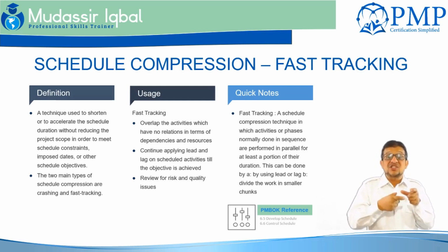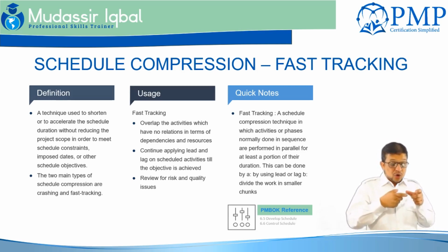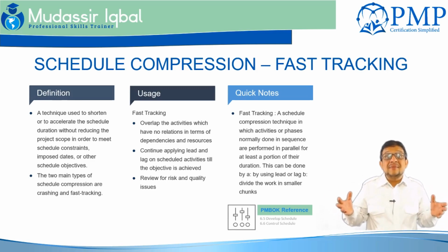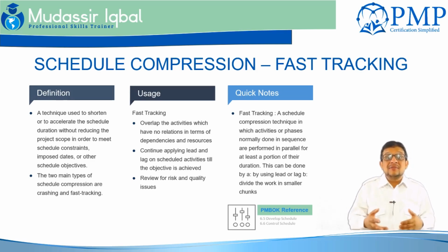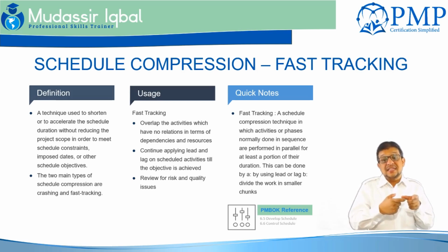So fast tracking may result in rework or increased risk by changing the relationship of activities. So risk is there. Maybe at the last stage when you take this design document to the sponsor, he will come up and say no, and change something drastically, which will impact your basis. And obviously you may not tell them that, no, we have started the work, because that was never the intent, to start the development before the design is done.